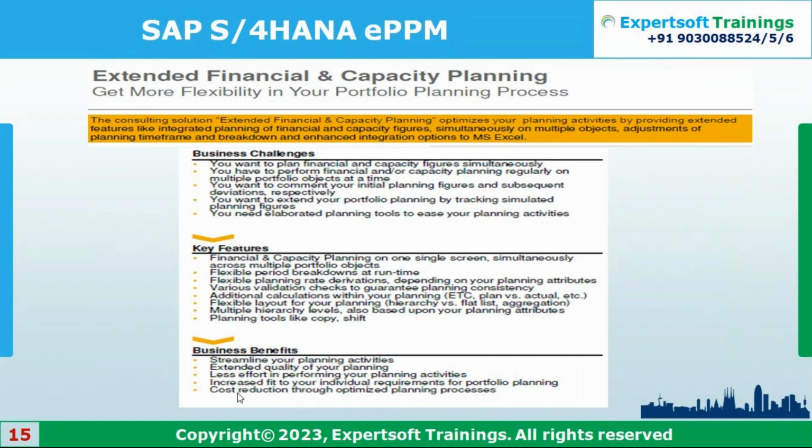Before we take on these projects or not, our portfolio management will help us, based on our scoring models, questionnaires, and risk assessments with respect to KPIs in the matrix. It will give you an extra edge on whether I want to proceed with these projects or not. If I want to take them, what is my risk, what are my commercial aspects, all of it will be given at this stage before we proceed to any operational projects.